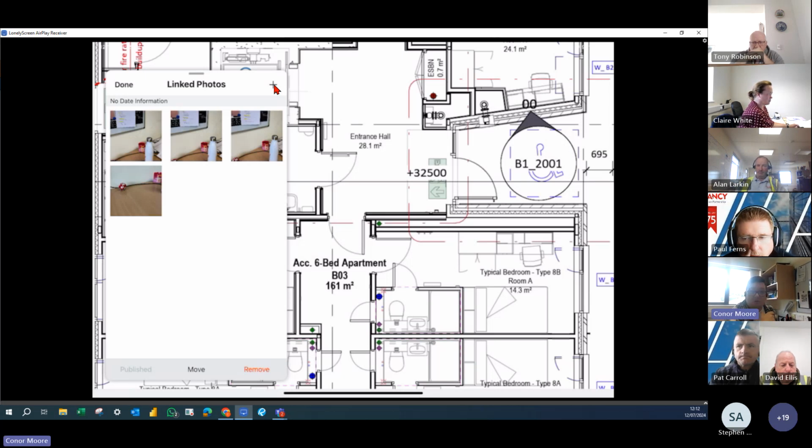Because we've pressed publish once, every new photo we do after that will be published as well, so we don't even need to press publish after the first time. And the great thing about this is, I think we're on Rev 1 or Rev 2 or 3. If a Rev 4 or 5 comes in, these photos will follow the new revisions as well, which is great.